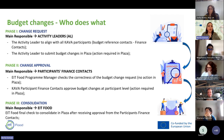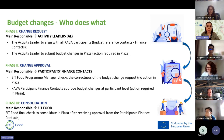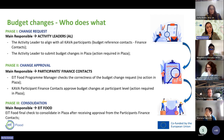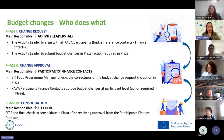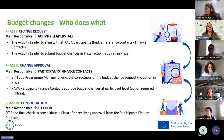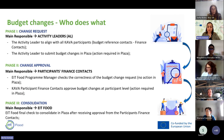The second phase is change approval. The participants' finance contacts are the ones who need to approve the budget changes entered by the Activity Leader. This is a double-check mechanism to verify the data entered is correct. Program managers also need to understand the correctness of the budget change request, but they will not have any action in Plaza — there is no approval mechanism designed for program managers.